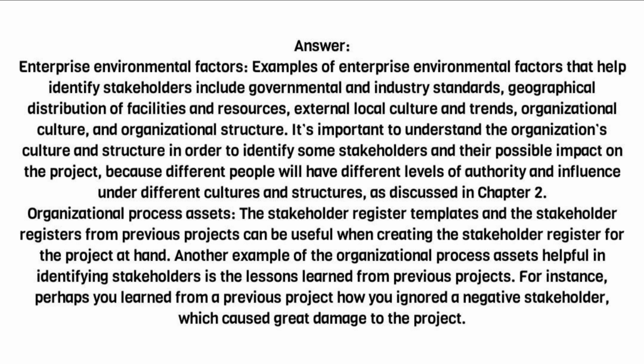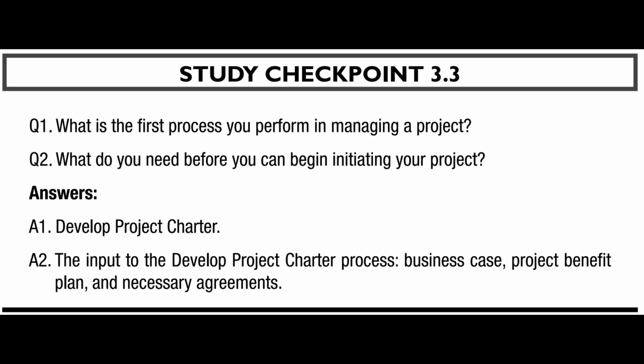Organizational process assets. The stakeholder register templates and the stakeholder registers from previous projects can be useful when creating the stakeholder register for the project at hand. Another example of the organizational process assets helpful in identifying stakeholders is the lessons learned from previous projects. For instance, perhaps you learned from a previous project how you ignored a negative stakeholder, which caused great damage to the project.